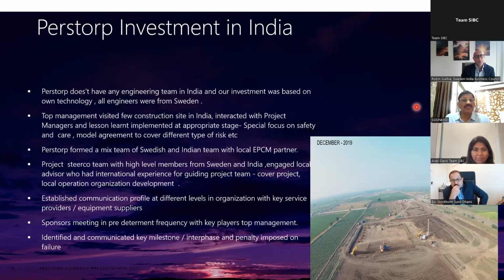And we have a sponsor for key players. We have sponsor meetings with EPCM and Perstorp, as well as some of the key contractors. The civil contractor is one of them. We have sponsor meetings at a predetermined frequency with the top management. And also in the project, in the beginning itself, we identified and communicated, as a part of the contract, the key milestones and interfaces. And we impose some penalty on interface failure.